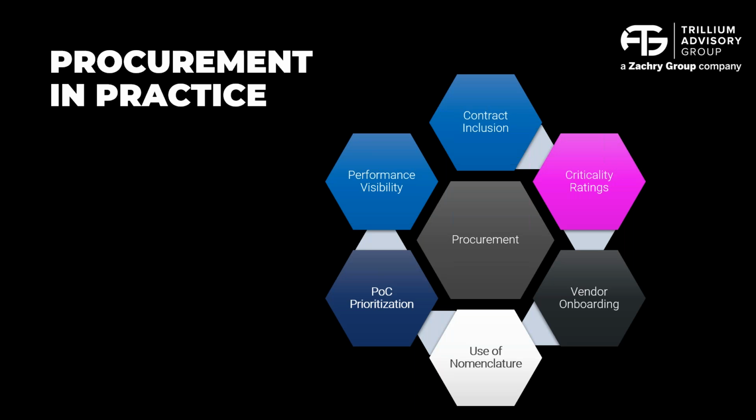As you touched on, there may be some POs that are across different areas. This allows us to really help sequence for the fabricators what we need, rather than just letting them run their own show. It's not good enough for the vendors and subcontractors to just deliver their agreed to products and scope of work. In some cases, the vendors and subcontractors are actually managing large scopes of work, whether on site or in their shops. What we did was make sure that there's language in the POs and contracts spelling out what AWP is and what their role should be.